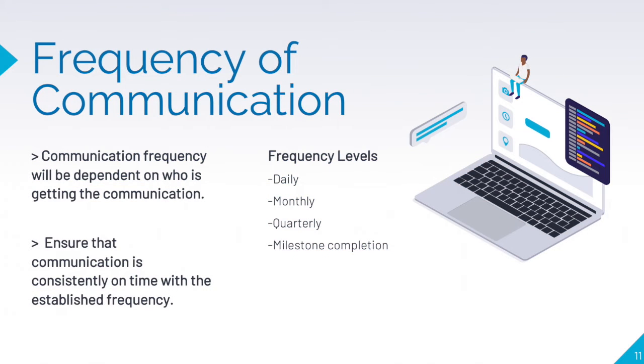Lastly, within a communication management plan, the frequency of the communication will need to be established. Frequency can be determined based on who the communication is going to. Some stakeholders will prefer daily communication, while others will want a weekly or monthly report. It is important to establish the frequency earlier in your communication plan to ensure that all parts of communication are met on time when deliverables are needed.